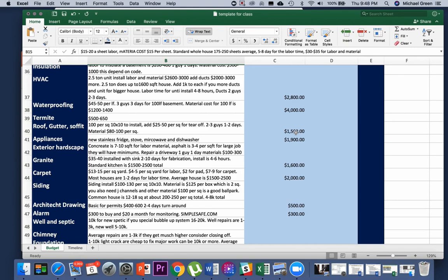For a little bigger roof, it's $5,000 to $7,000, a little smaller roof, maybe like $3,000 to $4,000. So again, keep this pretty simple. If the roof's in pretty good shape and it maybe just needs repairs and some small work done to it, then maybe just throw $1,000 in, just enough to get somebody up there to clean it up and get it certified.